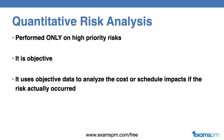For example, if this risk were to actually occur, the impact would be we will be $40,000 behind schedule. So we're actually putting a numeric term behind it. This will allow us to see how much reserve we need in our contingency reserve in order to cover this risk if it were to occur.